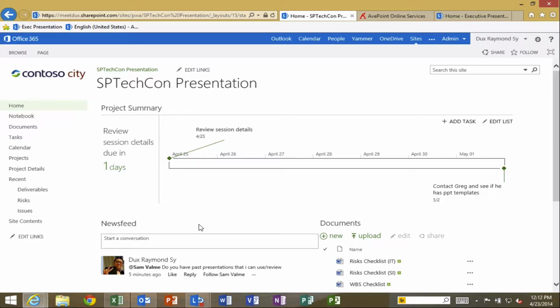I said, okay, Miss Sally, forget what I said. I'm going to show you a feature in Excel. She goes, what? So here's what we're going to do. Instead of emailing Excel files every month, I'm going to tell project managers to just put their expenses on the project site where it should be, and as soon as they enter it, it's going to automatically show up in an Excel file sitting on your desktop. You don't have to deal with emailing. Really? I said, yeah.